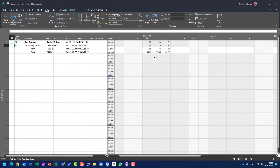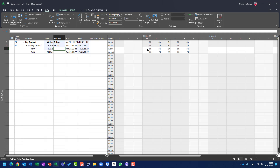It doesn't make complete sense, but that is how it works. For example, if I set five days duration, since 100 divides evenly, you will see John works eight hours per day for five days and uses 20 bricks per day. But if I set six days, since 100 cannot be divided into a whole number by six, you get 16.67 pieces per day.